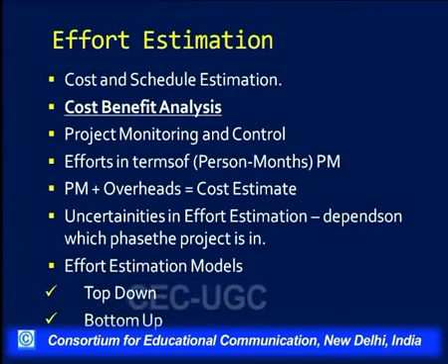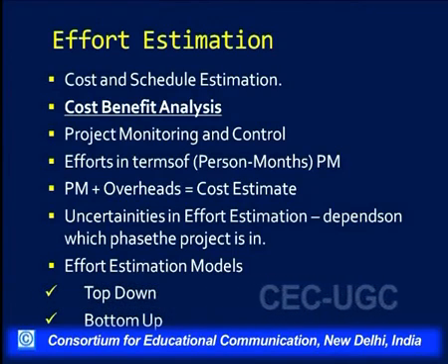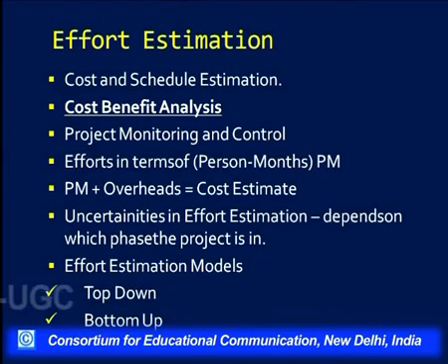Vis-a-vis, if a project has been completed and then you are asked to calculate the effort which has gone in, that will give you the most accurate idea of how much effort has gone into that particular project. So basically, effort estimation can be done at any stage in the project life cycle, and the later the effort estimation is done, the more accurate the results will be.